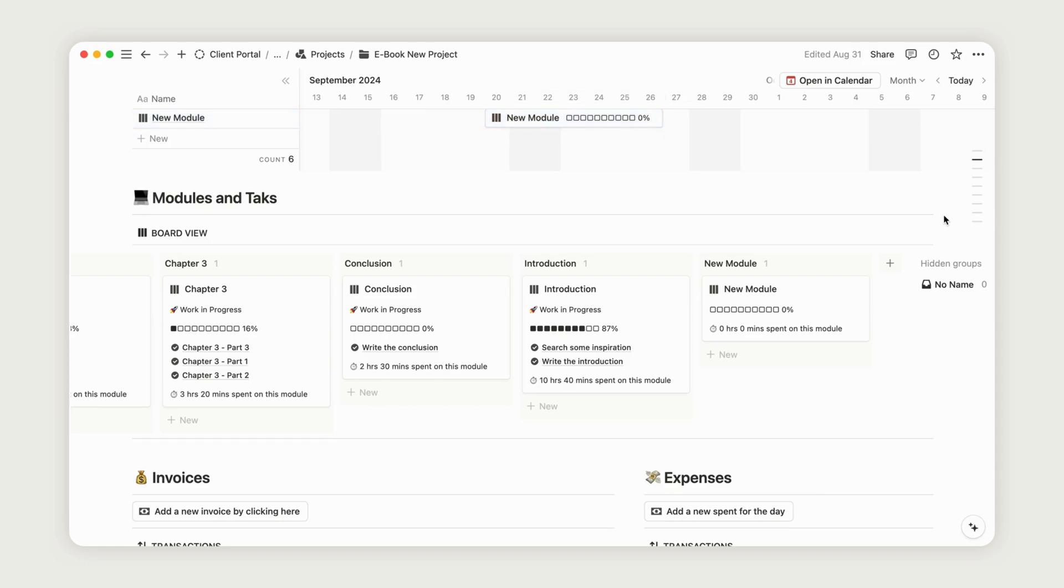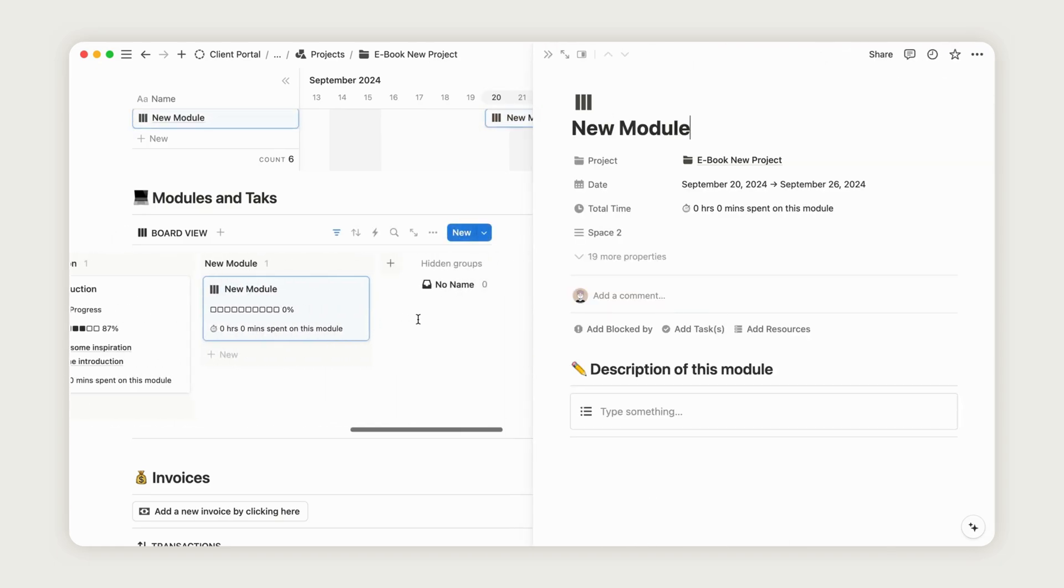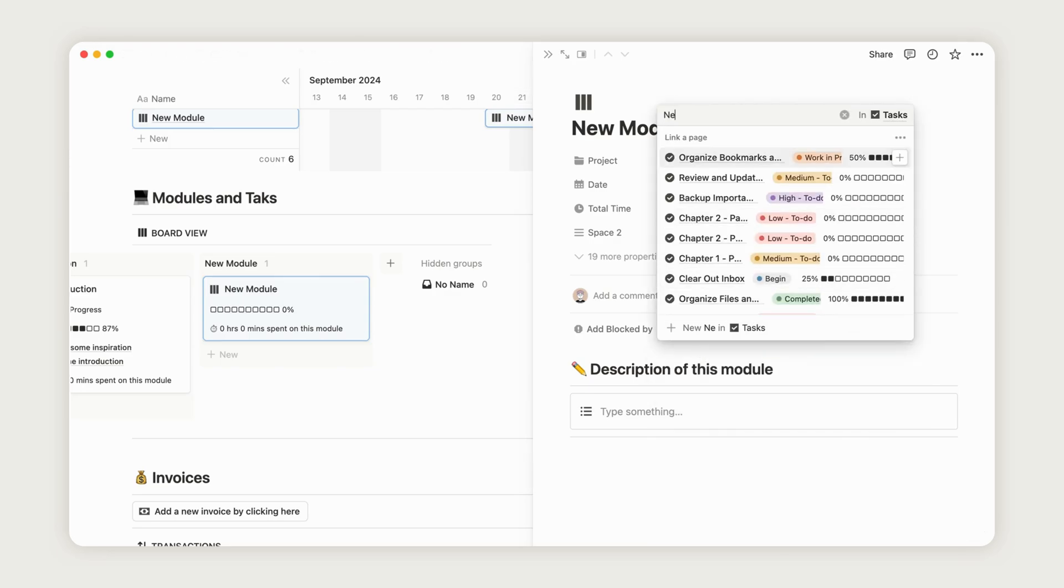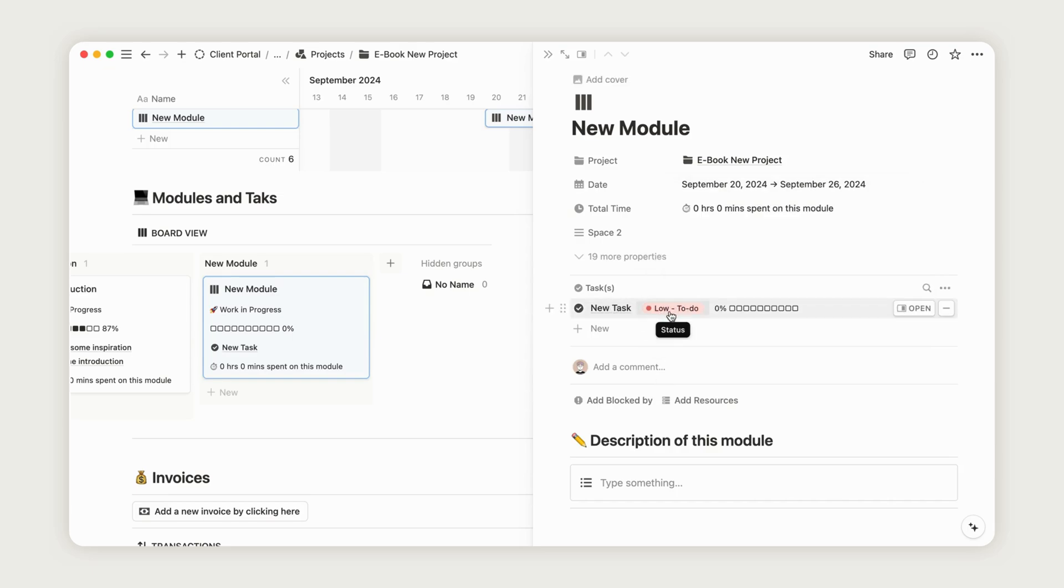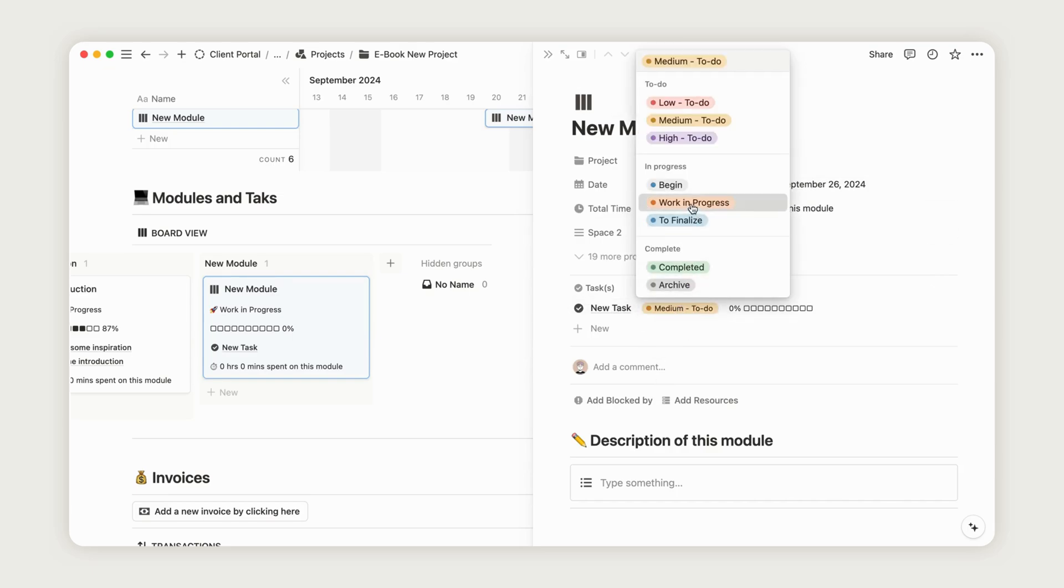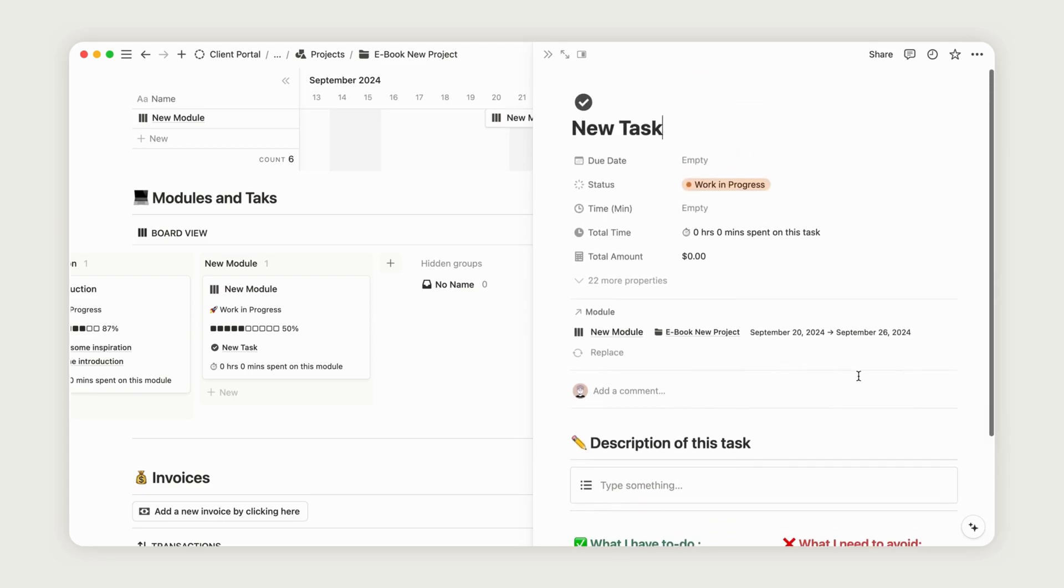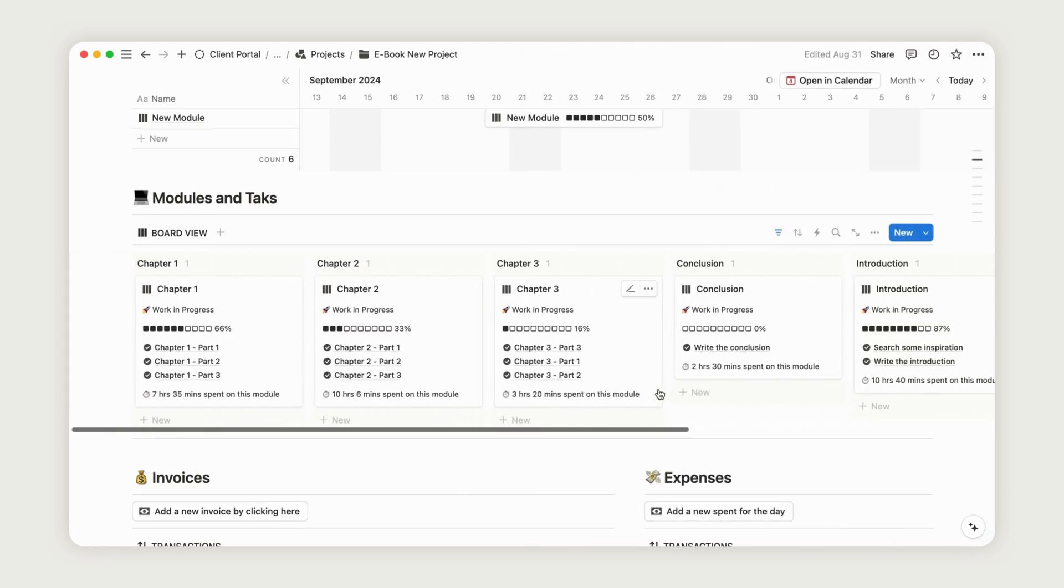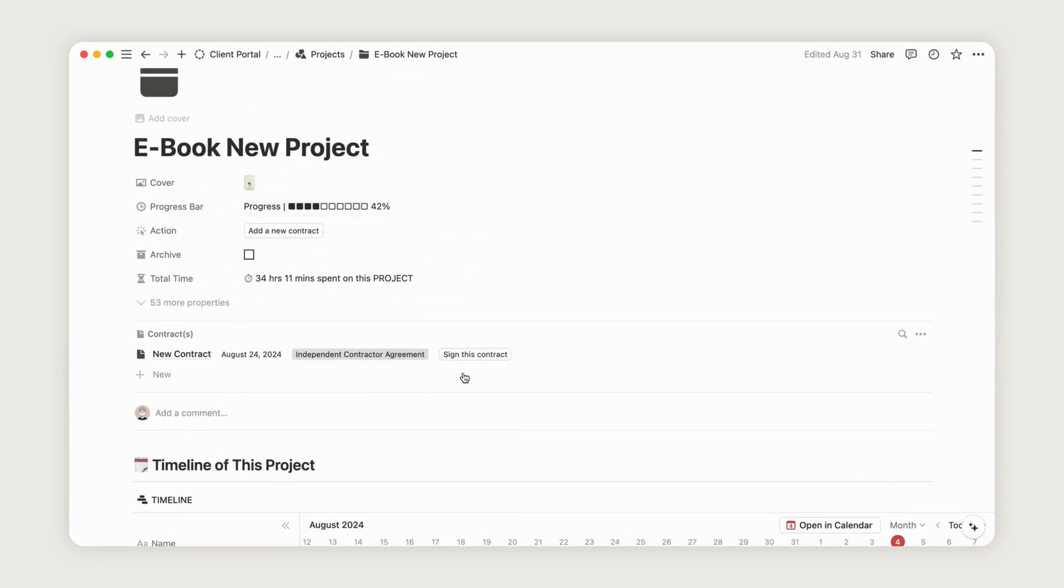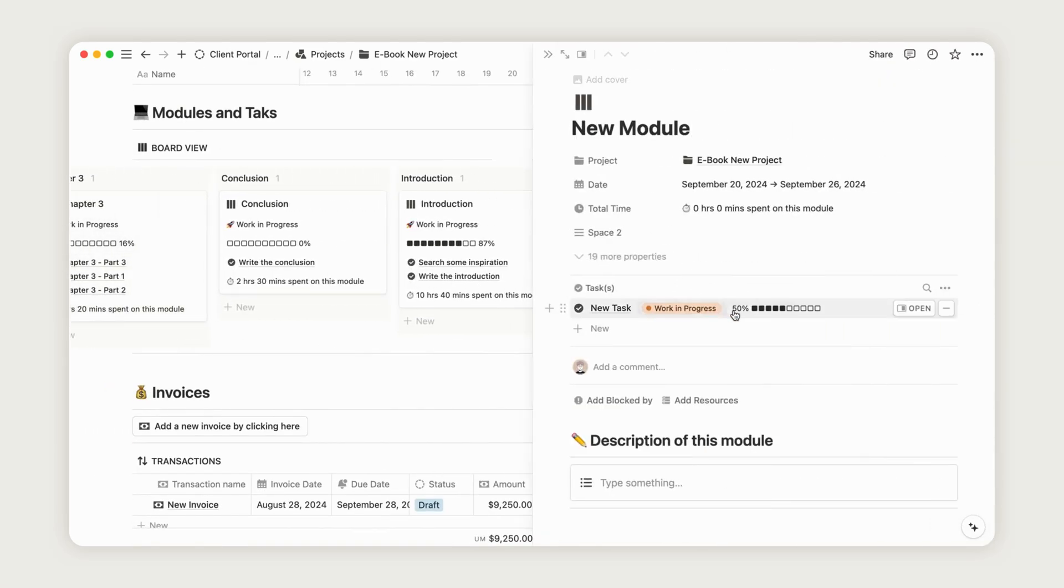To add subtasks to your modules, click on a module, then click the New Task button in the Linked Tasks Manager. Name your task and set the due date. The task will now appear in your project dashboard. You can update the task's status to reflect its progress and add detailed descriptions, allowing the overall project progress to update based on the status of the tasks. It's crucial for the client to see the project's progress, so the progress bar of each module reflects the average of linked tasks, and the overall project progress corresponds to the average of each module. Don't forget to track the time spent on each task by entering it in minutes. It will automatically convert to hours and minutes.